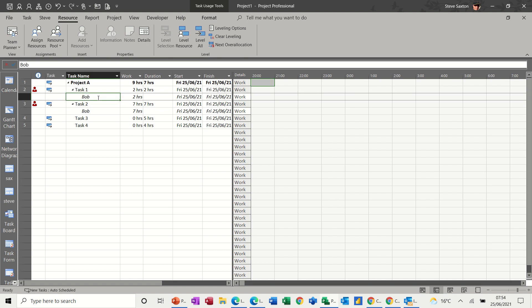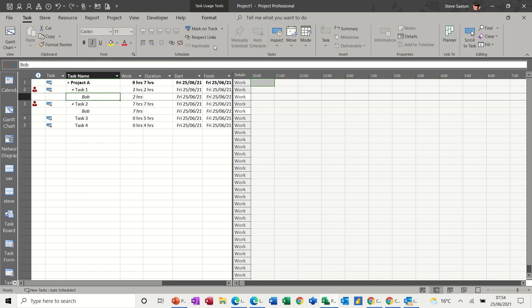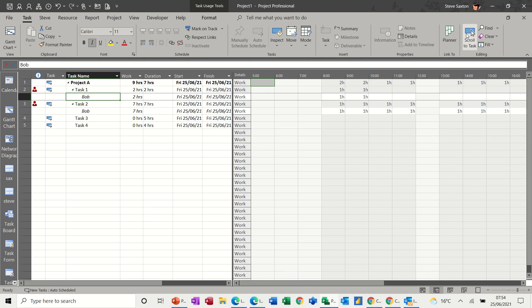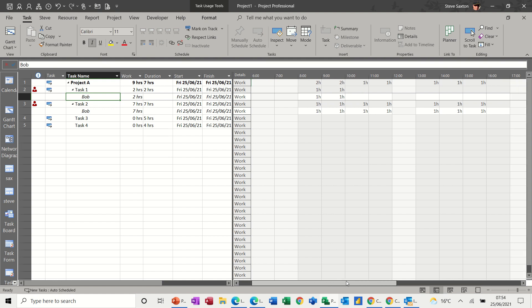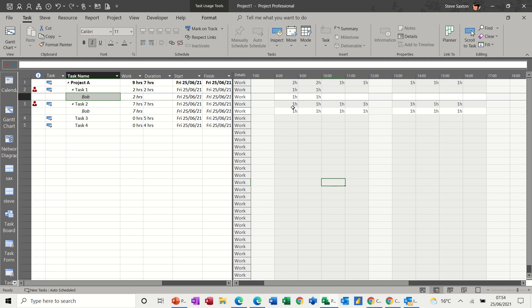Now, same problem is you lose your task, but you can just quickly click on the task tab, and then scroll to task. And then you get the hourly breakdown for those tasks. And if it is an over allocated resource that you're trying to sort out, this is a good way of looking at that, because you can see where the over allocation is. Bob's down for task one and task two at the same time on these two hours. Obviously, you can't do that. So somebody else would have to do that, but you can see the breakdown quite clearly in hours.